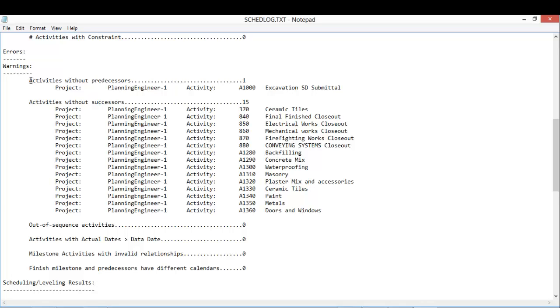So I can accept to leave it without a predecessor. But activity without successor, something like ceramic tiles...